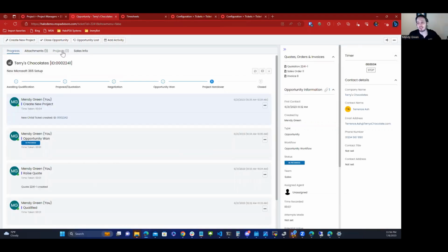So the thing about this is you can technically build out larger projects that are made up of different types of projects. Let's say it's a brand new customer onboarding and you have 5 or 6 projects to do with that onboarding. You've got to do the actual discovery, the security services rollout, the cloud setup, 365 and whatnot. All these different projects could fall into different project types under different ticket types.